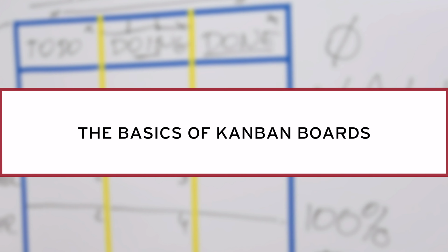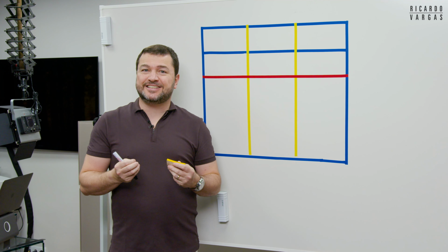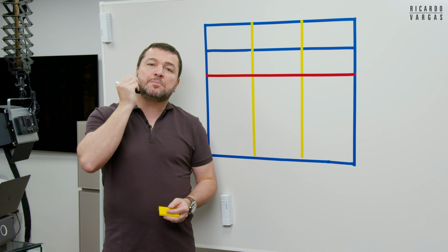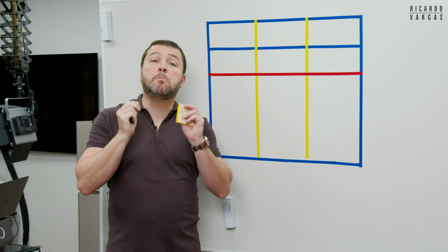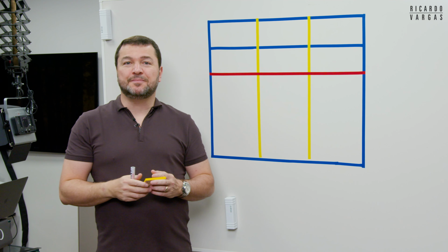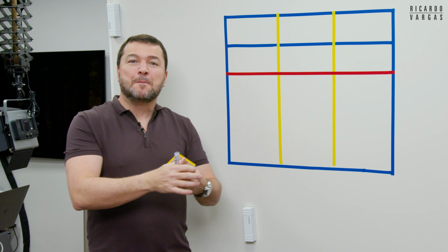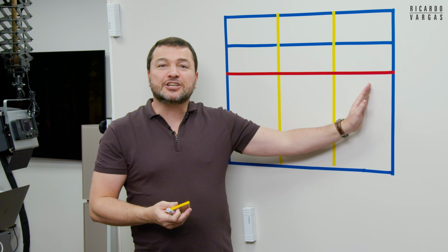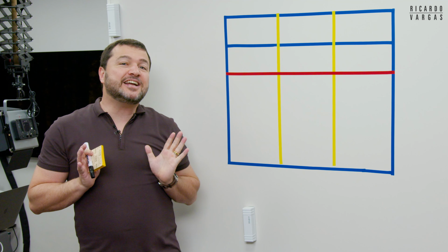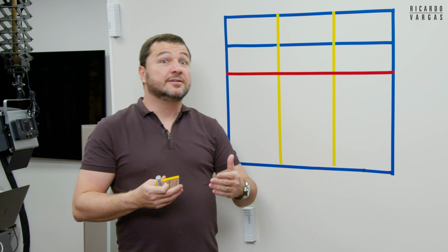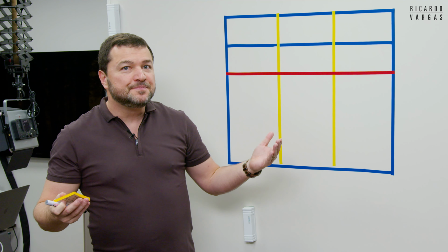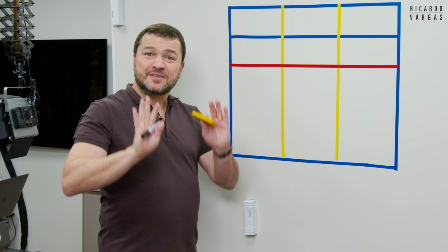The concept of Kanban boards was created by Toyota in the 1940s, and it was mainly aiming to control the logistics using a basic principle of governance. It's the pull system. And what is the pull system? It's something that is not pushed through the production line, but the final areas of the production pull the work. So instead of being a push, like for example the Gantt chart, it's a pull system where the final result drives each of the steps to that.